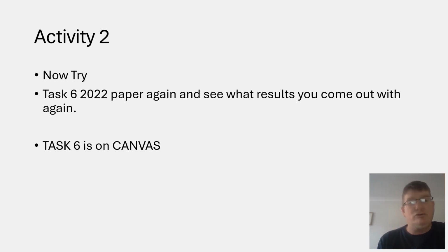What I want you to do is, I don't want you to do a line of balance because it's not asking for that. Before you produce that Gantt chart, produce a resource histogram. Try your best. Look at mine. Remember, I think it's 20 operatives. You can't go over 20 operatives. Then from that histogram, produce your Gantt chart and see if it reduces the time in any way, even if it's a couple of weeks. It's still going to be cheaper. Try that. It's task 6.